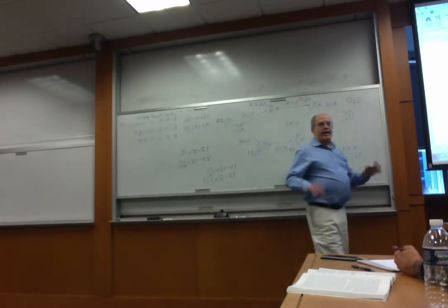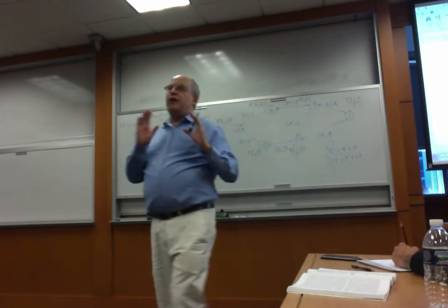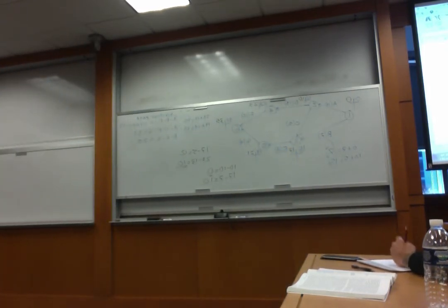Okay, let's pause for a minute. First of all, I give you a strong hint. If you are able to end up with a 0 when you go back, this is a very strong hint that everything is right. You haven't made any calculation error. If you do it right, when you go back, you must end up with a 0. Remember, you started with a 0, you reached 35. Then going backwards, if you start from 35, you have to reach 0. So the fact that we ended up with a 0 is a very strong indicator that we did it right.